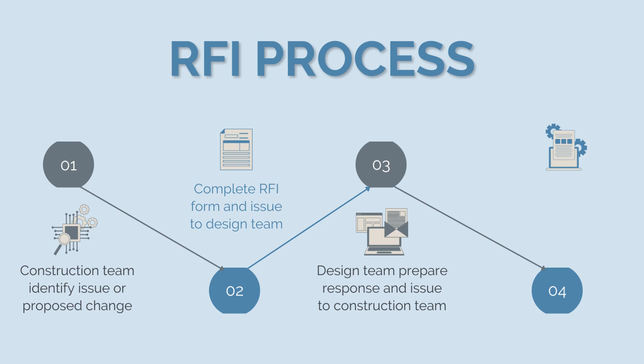There may be some back and forth in this stage depending on whether or not the construction team is happy with the response. In some instances, they may not believe the response is correct or it is still missing information.